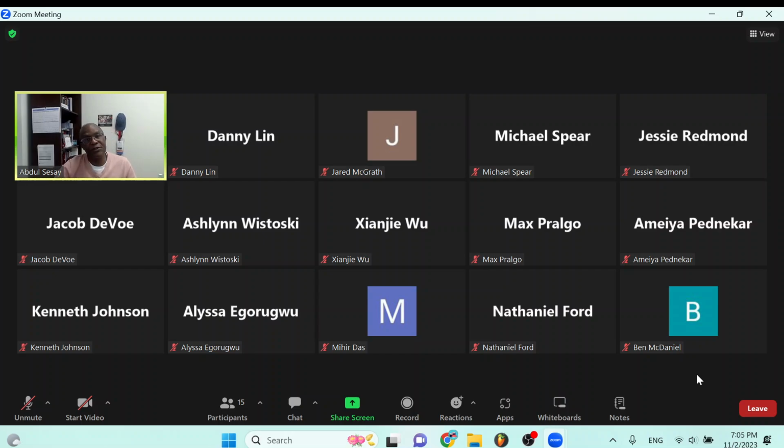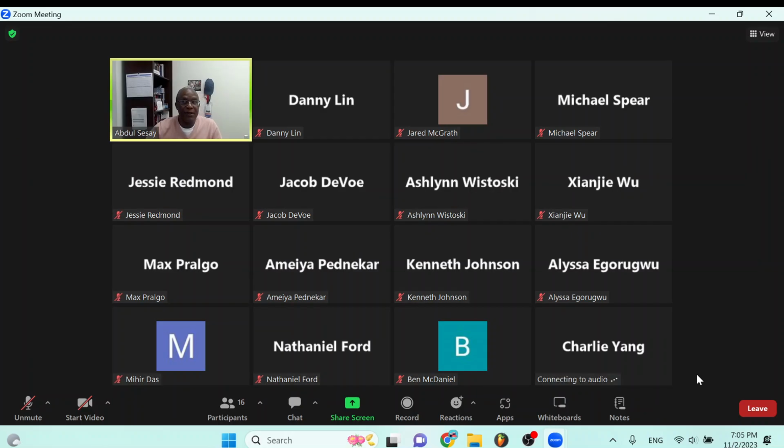A few groups also decided to develop a database schema. There is nothing in the product backlog that talks about a database schema. And I know you guys can develop non-functional user stories, which is fine. But if a database schema is not really useful in any way in this project, and you're not going to use it for any reason whatsoever to meet the functional requirements, then why are you spending time on a database schema, right? So you should ask yourself that question.